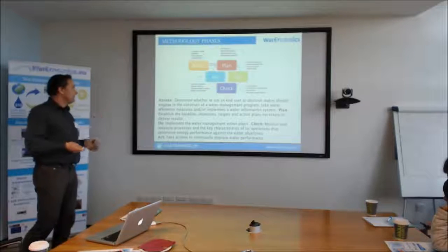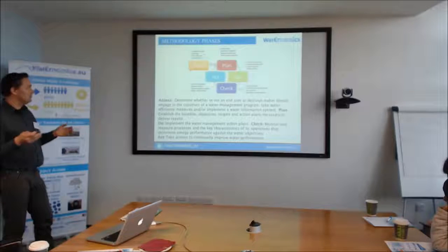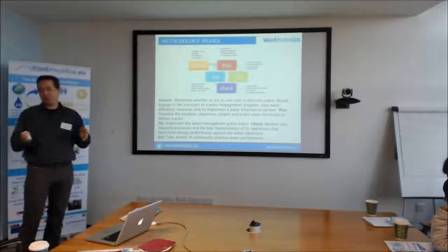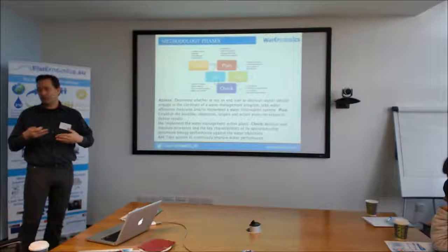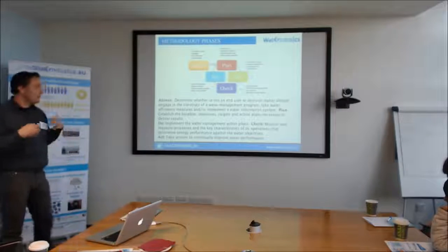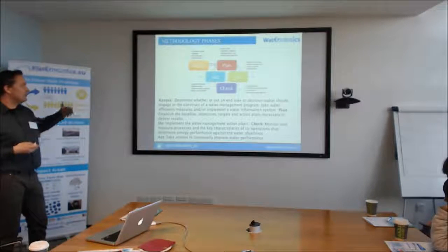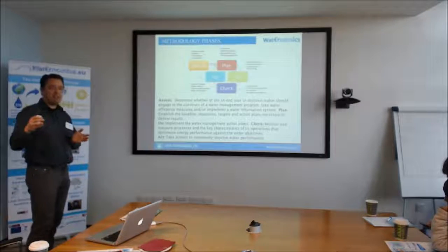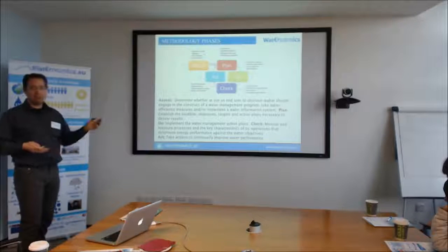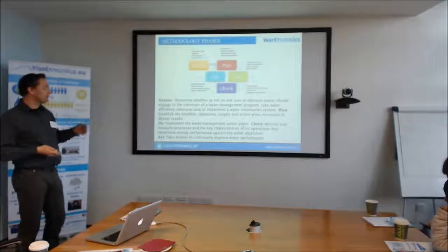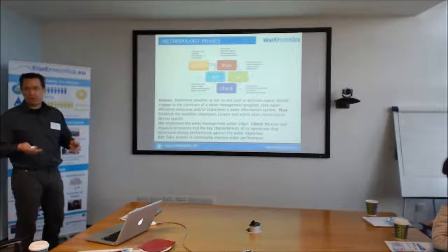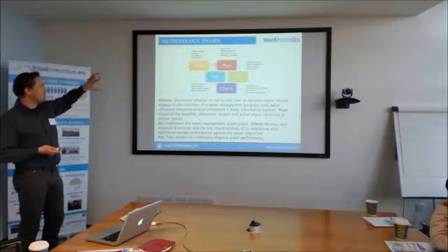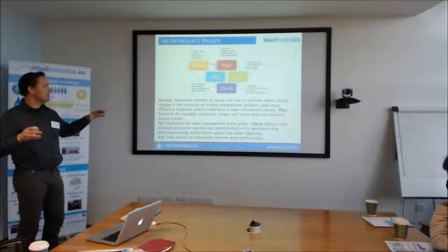Looking a little further into these phases, when you start, you look at this as an organization. It basically targets public organizations, commercial organizations, businesses, and not individual households, because that's too complex. Within these organizations, you start with an audit. Baseline, where are you with your organization? Is water really important for us, or should we focus on energy? How does it fit in corporate programs like sustainability programs? And can we free up resources and make people and money available for these kinds of actions?